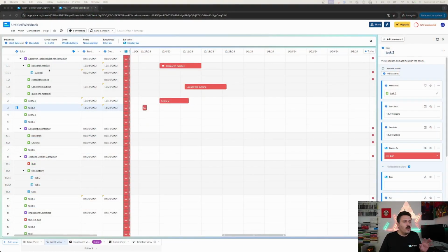And so as you make a lot of children and as you build out this hierarchy in Jira, your numbers are not sequential in the way that a traditional project manager sees, where you have like 1, 1.1, 1.1.1 to indicate the hierarchy. But take a look at what Visor does. Your keys are still respected. They're still very much here, but you're gonna get a traditional numbering view that is much more familiar to project managers. And this is a benefit that I really, really like when you use Visor over Jira.